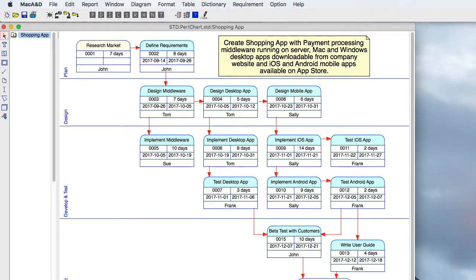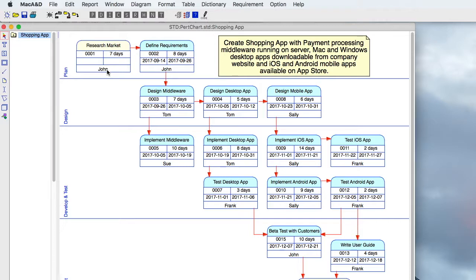When drawing a new PERT chart, you'll probably start by just identifying all the tasks and the dependencies between those tasks, kind of working from left to right across the diagram. Later, you'll go back and assign the amount of effort to each task and assign it to a specific person.